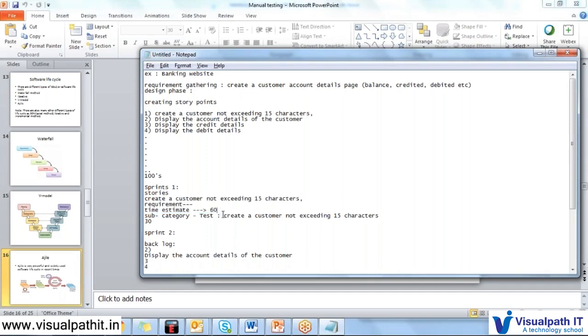Then once this clarification comes, he will shift from that to here. So this is one of the advantages and disadvantages. The advantage is that the developer need not wait for the clarification. He can shift to the next work and do it. The disadvantage is that he has to transfer from one task to another, which will create a little bit of confusion, and he will take some time to cope with that. So that is the one advantage and disadvantage.